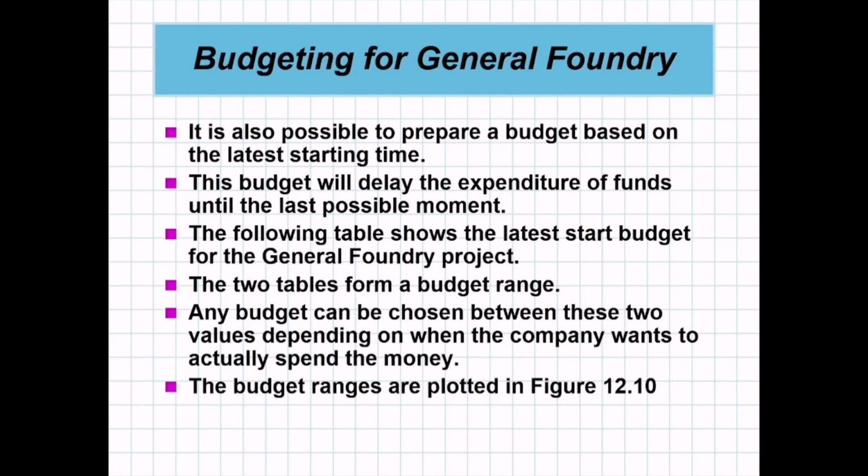Okay? It is also possible to prepare a budget based on the latest starting time. This budget will delay the expenditure of funds until the last possible moment. The following table shows the latest start budget for the General Foundry project.